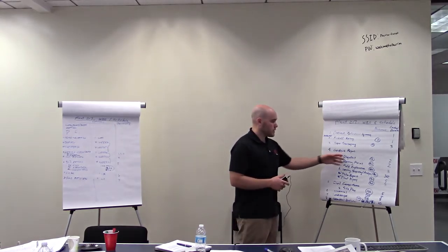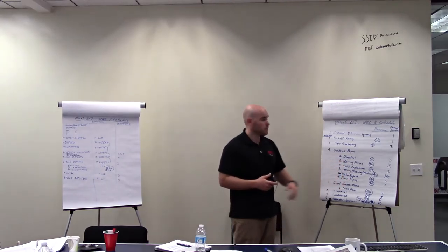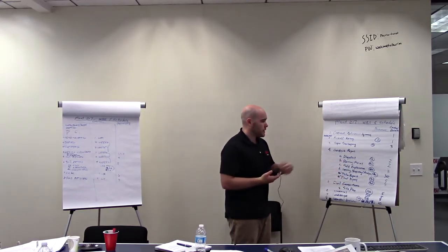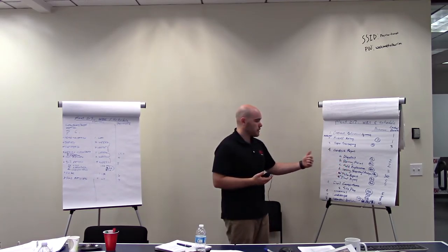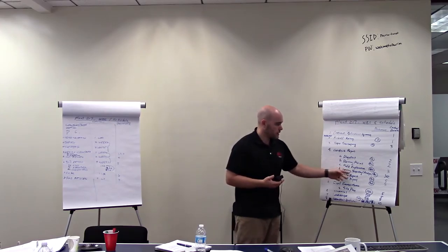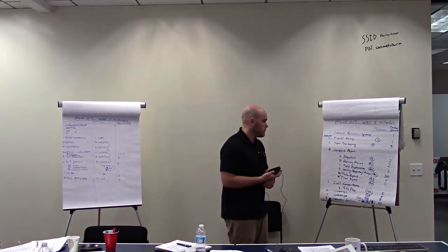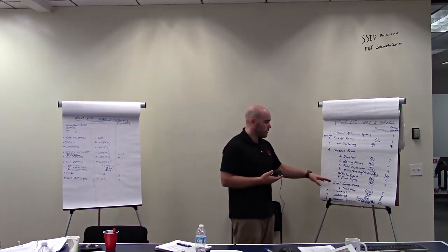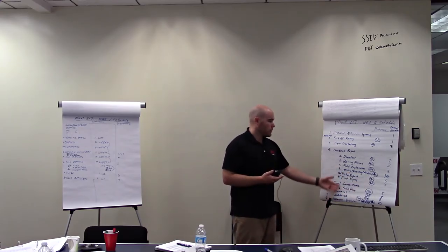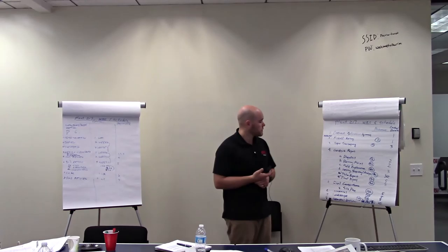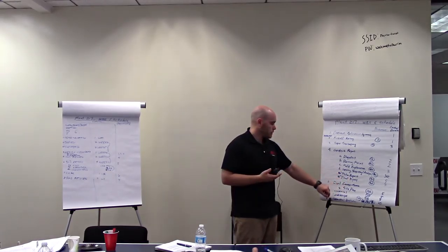And then step four would be the geotech report. There are several items that are tied to the geotech report: dig alert, boring, permit, field exploration, testing, reporting, analysis, and then a preliminary, and then a final report. So these are all predecessors. As you move down, each one becomes a predecessor for the next one. So we assume 2 days for dig alert, boring, permit, and then 3 days for the field exploration, and then testing, reporting, analysis, and the preliminary and final report, which is 10 days, we're assuming.